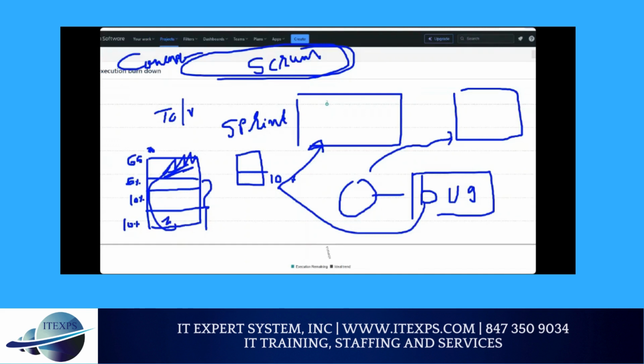You can adjust that, and the product owner may be very dynamic. He says drop story 1 and story 2, fix bug 1 and bug 2, because that's a showstopper. So it's all about what the product owner does, but they normally don't impact the sprint. They use the reserve capacity, which is normally 10 to 20%. Normally the team keeps it if the product is in production.